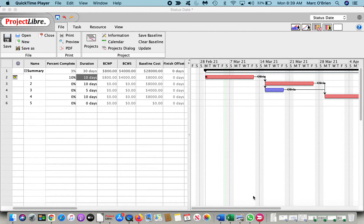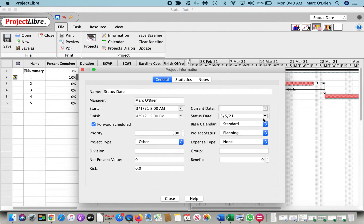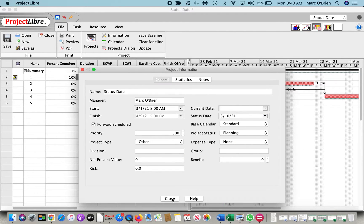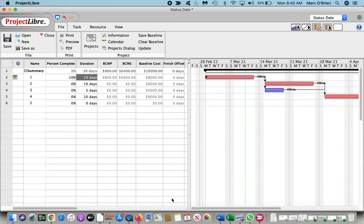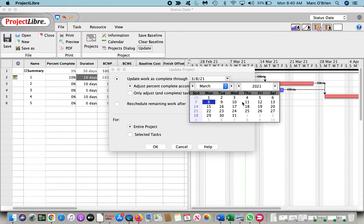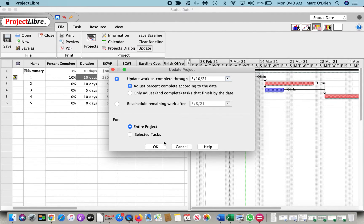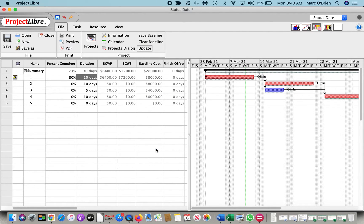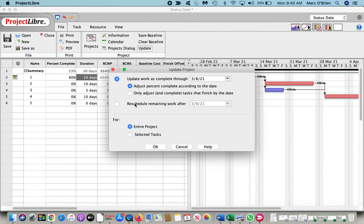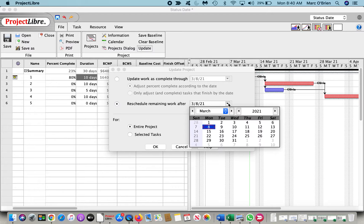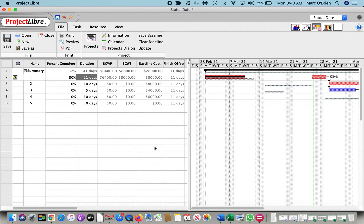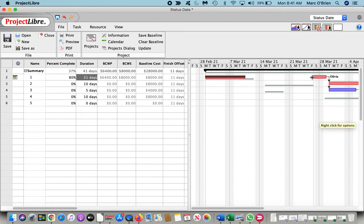Let's pivot a little bit on rescheduling the work. Let's move the status date to the 10th, so go to information, status date, and let's move that to the 10th, and I'll close. If the project is running on schedule, there's a shortcut for updating tasks. I can say update, and I can update through that. I say update through the 10th, and say for the entire project or selected tasks, say okay. And you can see that progress has now been completed through the 10th. Another feature of update is if Olivia does take more time off, for instance, we can reschedule remaining work. Let's say remaining work after the 25th of March for the entire project. And what will happen, you can see that task one has been split, and all work has now been shifted after the 25th.